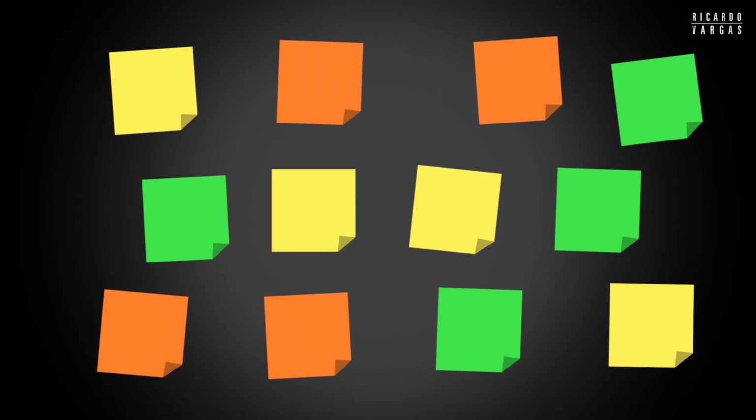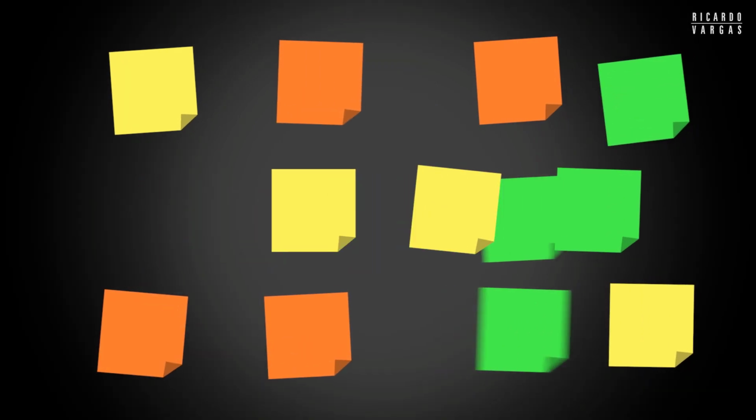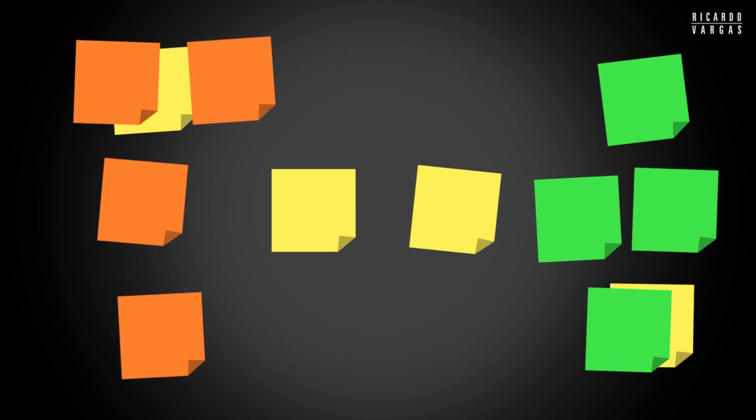First one, it looks strange, but use colorful post-it notes. Give the green one to one person, the orange one to another person, the yellow one to another person. Why? Because when you see the map of the final risks, what will you see? You need to see a rainbow. You need to see full of color. If you see all yellow, what is happening? It means someone with the yellow post-it is dominating the discussion.